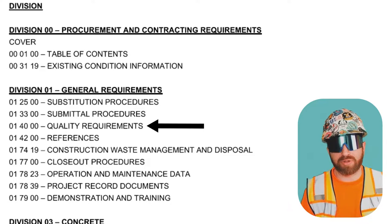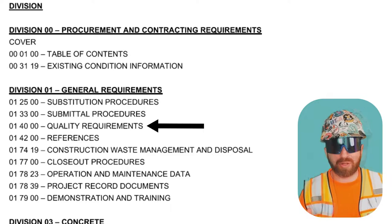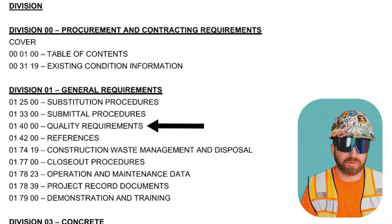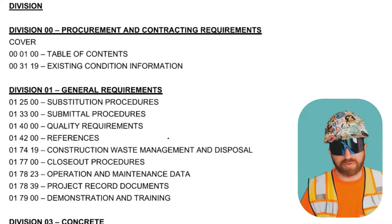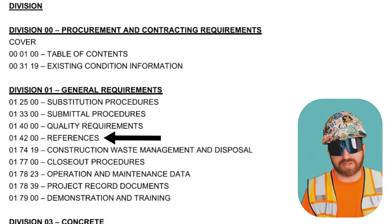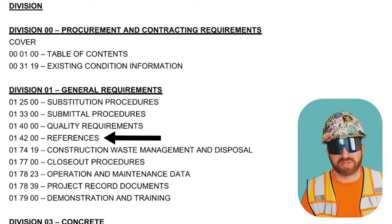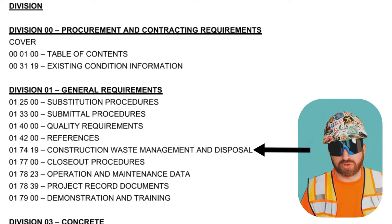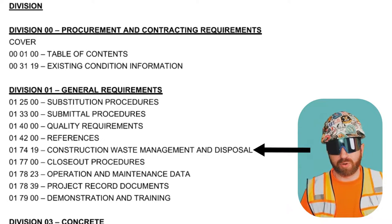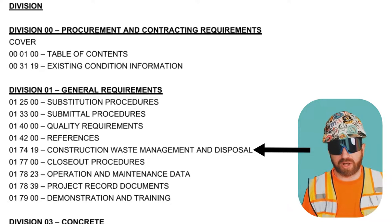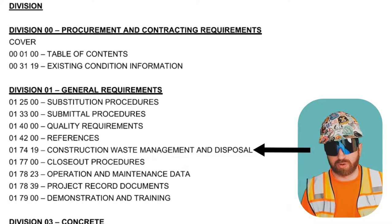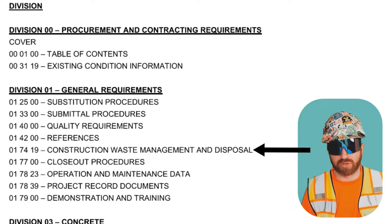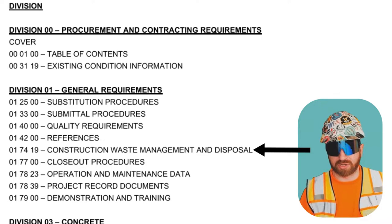Quality requirements outlines how to complete the scope to a particular standard and can also include testing requirements. References — this section usually outlines industry organizations that set the standards for building construction as it applies to this specific project. Construction waste management and disposal is usually included if you work on a LEED or green project, which outlines how material is supposed to be sorted before it goes to a landfill or recycling station.